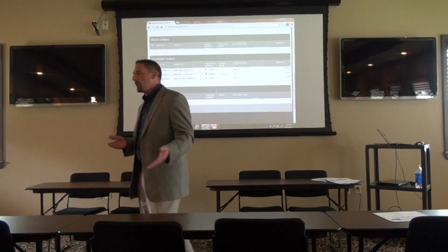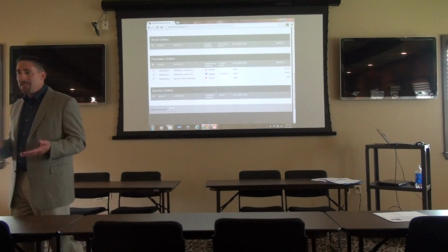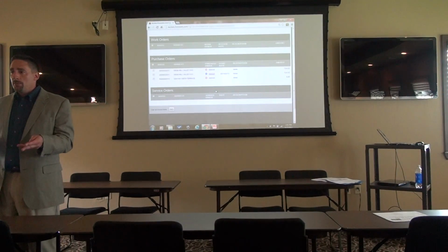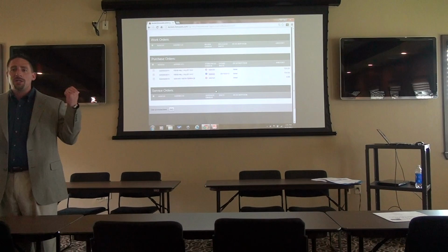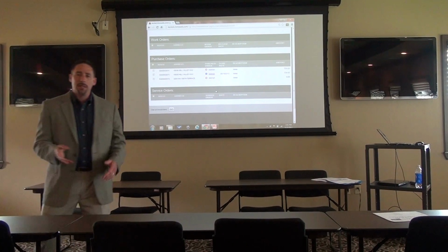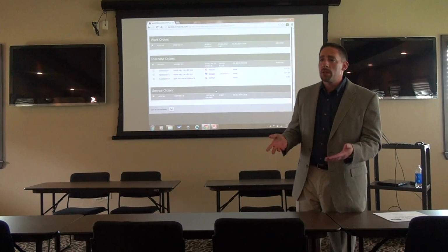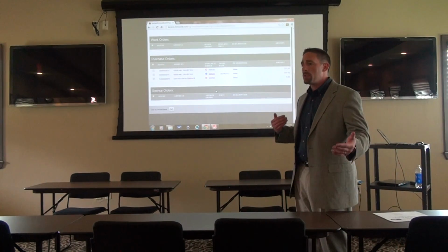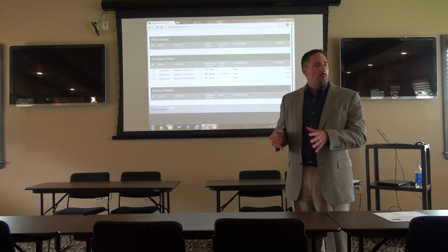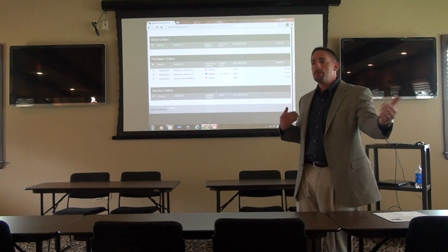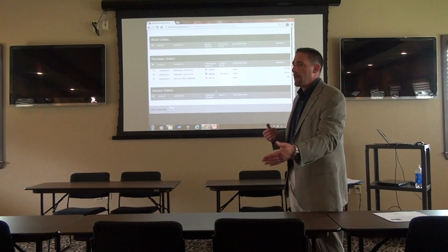Don't say you need like 8 weeks, because what's going to end up happening is if you tell them you need 8 weeks, they'll give you 9 because you said 8, but then you're going to end up with work orders and purchase orders going to be changing on you like this because buyers change their mind, and try to be reasonable about it, because the more options they sell, the more money you're going to make. But we want your POs and work orders to be accurate, okay? So when your work is released, it cuts off all the options that could have made you money. Think of it that way.